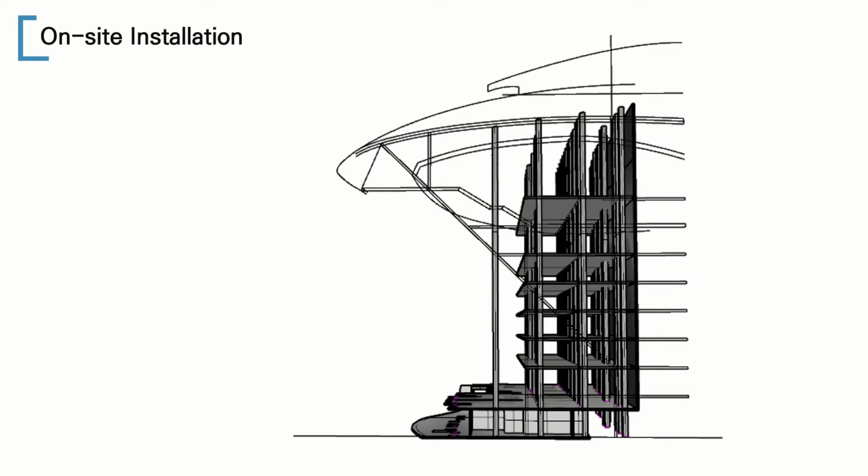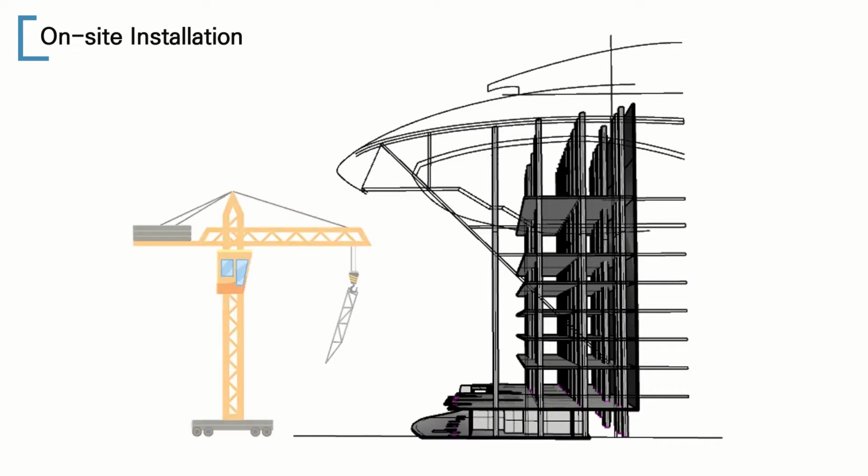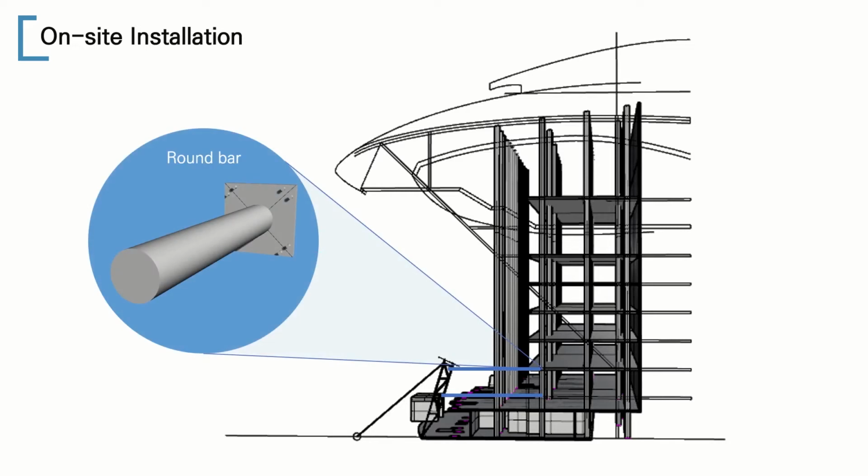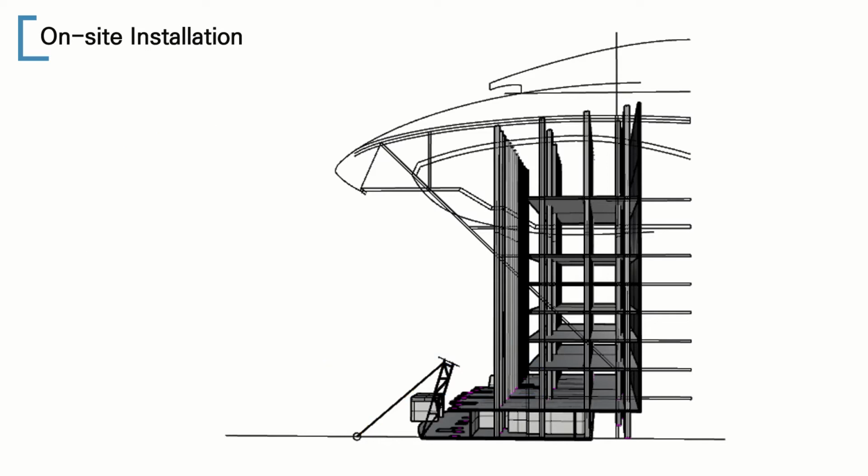Let's look at the order of steel installation through the cross-sectional view. For the first line, the unit tower is set up. Secure the load to the PRD column. At this time, the embeds are buried in the column. Secure the unit to the bottom of the ground floor with wire. Install the second unit with a crane.